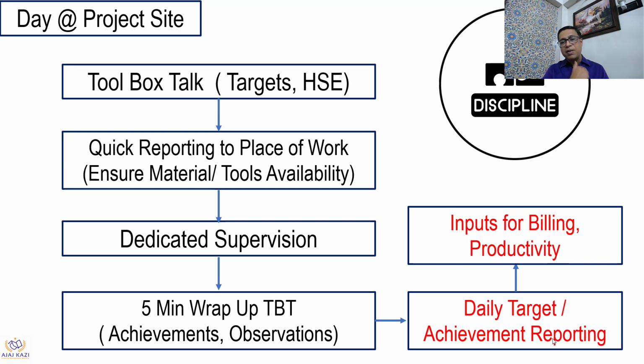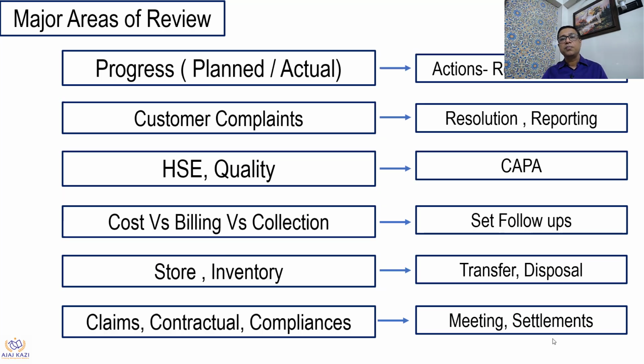Always have a 5-minute wrap-up TBT in the evening just to get an idea about any safety related issues, or about targets, what was achieved, and this can be your input to your billing, right? It can be input to your next day action, and the targets and achievement can become part of your daily billing. What review must we do when it comes to the project site?